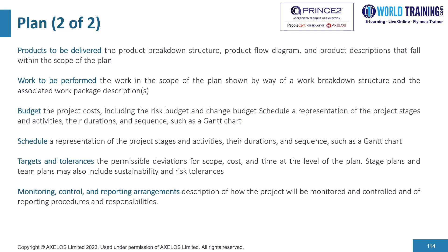There is a section on targets and tolerances, which provide a permissible deviation for scope, cost, and time at the level of the plan. Stage plans and team plans may also include sustainability and risk tolerances. Finally, there is a section on monitoring, controlling, and reporting arrangements, providing a description of how the project will be monitored and controlled, and of reporting procedures and responsibilities.